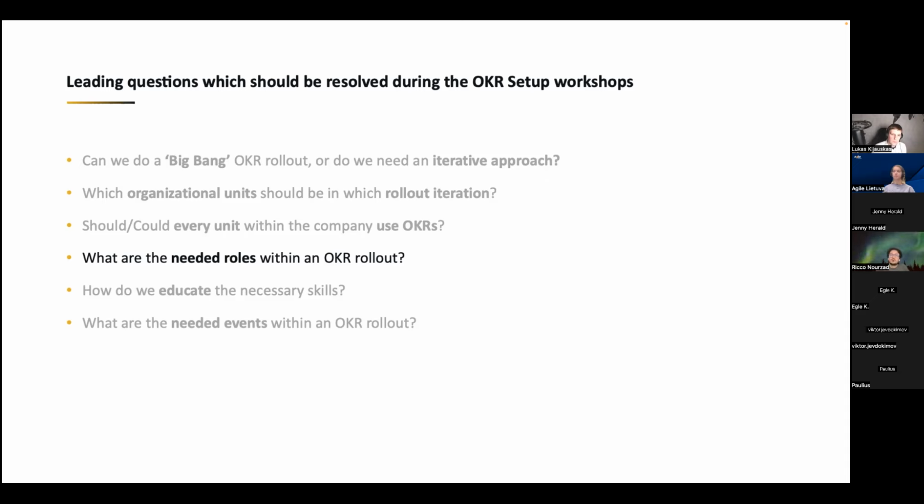And then also OKR coaches or OKR masters, however you call it, which is around about 3% of the people who should have this skill. So it's not a full-time job, but they have this skill. It can be an additional hat for a Scrum Master or an Agile coach if there's still capacity, who are then also facilitating the workshops and sharing the knowledge when it comes to OKRs.